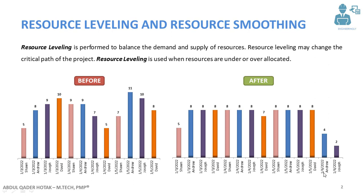The four hours of work for Andrew are moved to 6th January. The same applies for Joseph — one of the working hours from the nine-hour day is moved to the next slot, resulting in eight hours here and eight hours here. Where Joseph works ten hours, two hours are moved to 6th January.